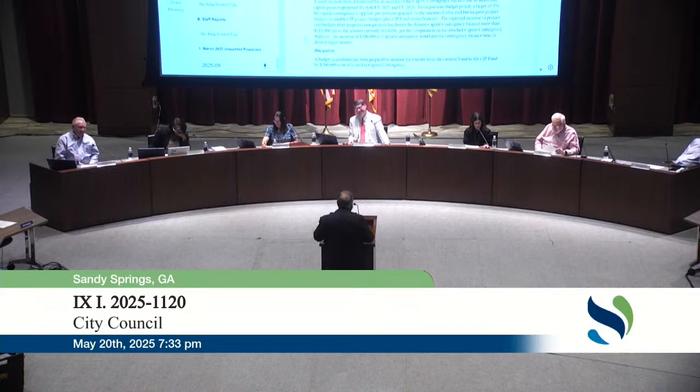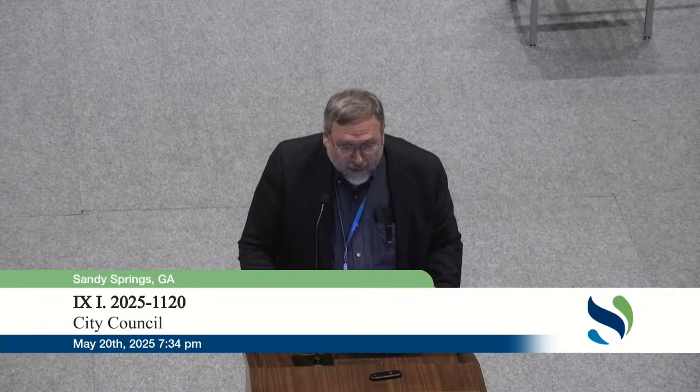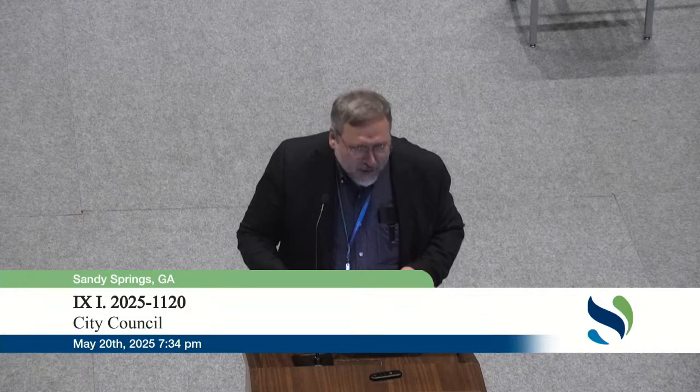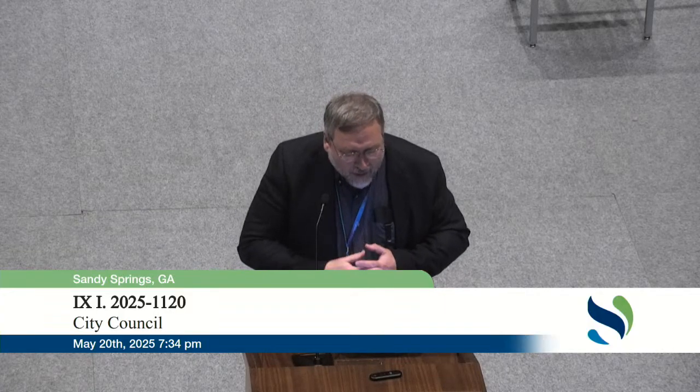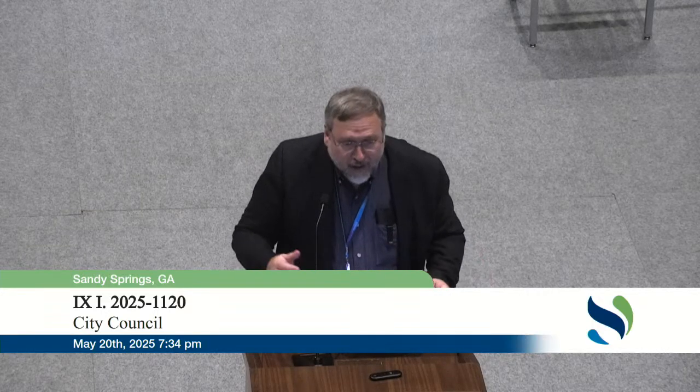Anyhow, this is the second budget amendment that I'm presenting. This is a little bit different. Generally, per a previous policy and previous practice, we try to make our capital contingency 3% of what we call open projects. That's available project budget plus any unexpended encumbrances like the open POs that we have. We usually have plenty, around 5, 6, or even 7. Don't quite get to that magic 10 that us accountants always like for contingency, but 3% is the target.